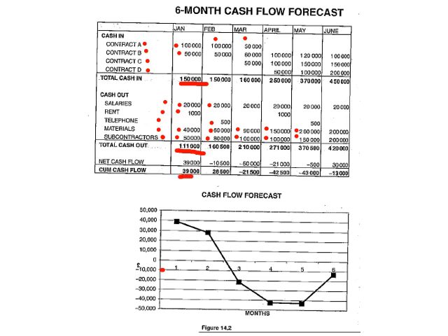So in this case, month 1, the inflow was actually more than the outflow, so we start with a 40,000 surplus, and then we've got our second month, your inflow is 150,000, and then your outflow is now 160,000. The difference is 10,000, so it goes down with that 10,000. So this is a cumulative